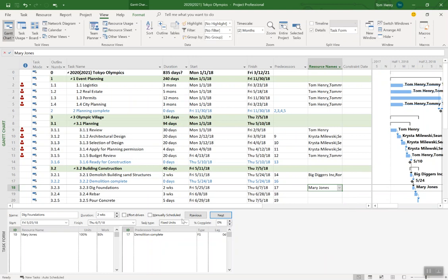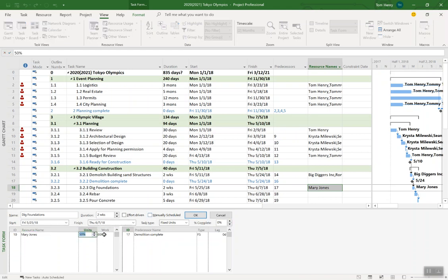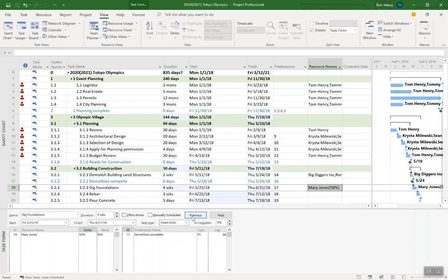You see down the bottom here I have this little widget. It's called the task form. It allows me to see all the different variables that I've set. So we can always see that I already had a duration set for this task. Units work. If I want to adjust this I can say well I only wanted to work part-time 50% units. There we go. We can see she's now 50% working on that. What I actually did is push out the duration. Used to be two weeks. She's only working 20 hours a week now as opposed to 40. So it adjusted the duration for me based on the units.